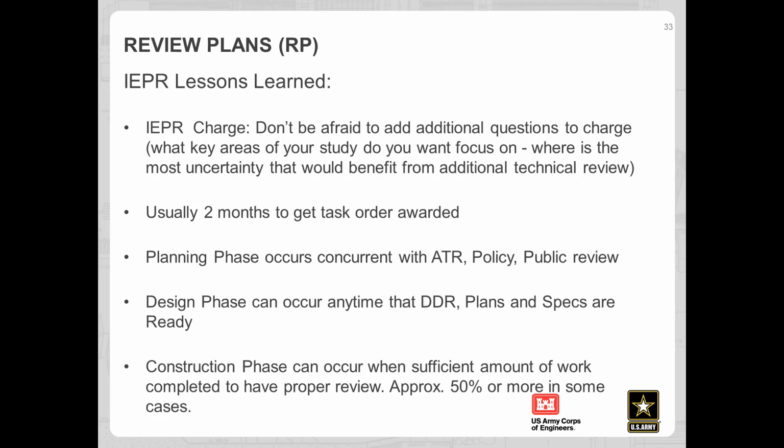In the planning phase, IEPR is generally concurrent, but the big key is when you're going to get your public review, and we've had a lot of studies where public review is lagging behind, and so we have to hold the IEPR open longer. In your design phase, SAR can occur anytime, when you're ready for that. And in the construction phase, it can occur when there's a sufficient amount of work completed, sometimes up to 50%.